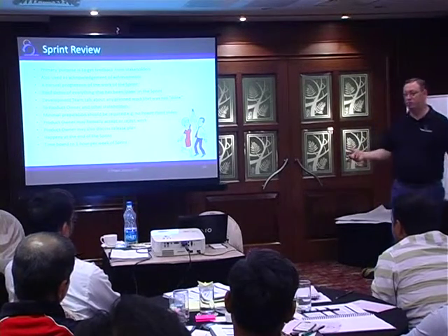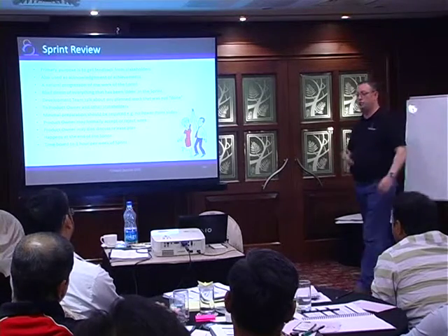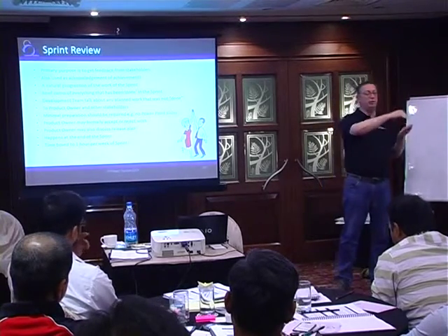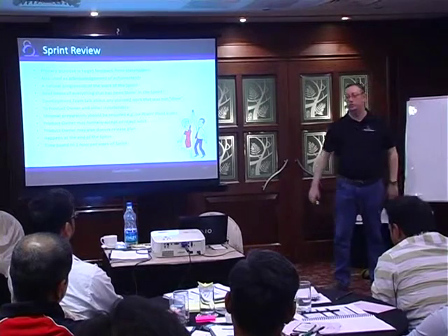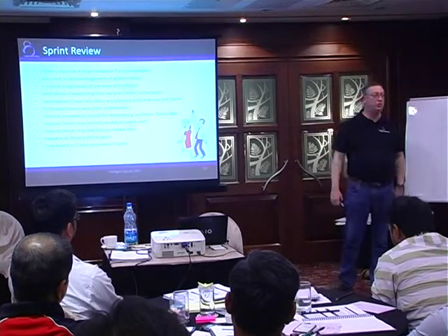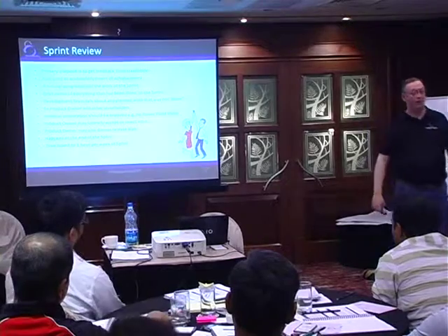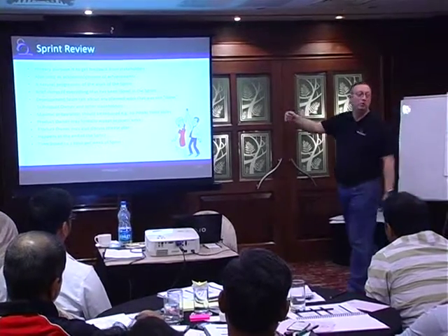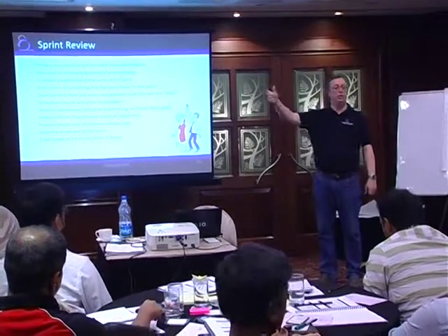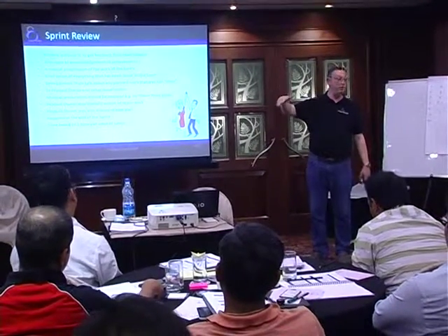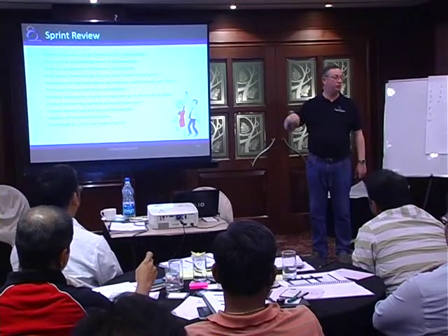We probably should only be reviewing the top of the product backlog with them. This is where we think we're going next, the next direction of travel for the product. Does this still align with your priorities? Here's the release plan we just prepared coming out of the sprint. This is where we are now. We thought we'd be at this point. We're actually here. This is how the backlog's changed.